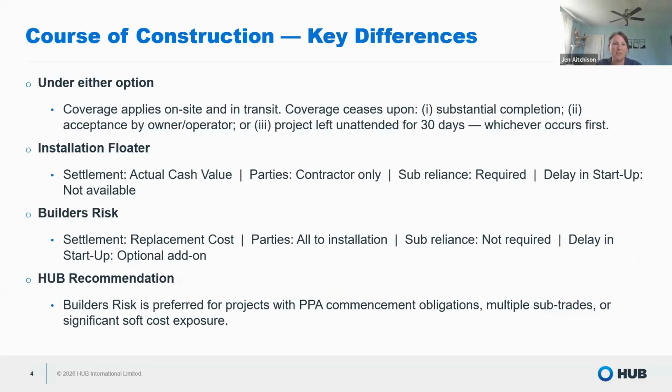Some more of the key differences under either the installation floater or the builder's risk: you can get coverage on-site and in transit. Typically, it ceases upon substantial completion or final acceptance by the owner, or, and this is key, if it's left unattended for 30 days.